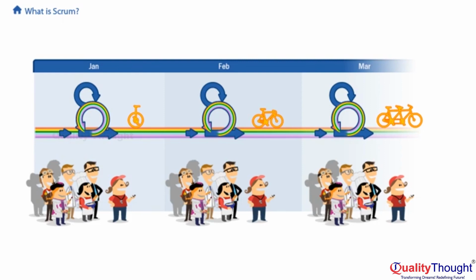Now, instead of waiting for the end to start our testing, we'll start testing with our very first sprint. Instead of doing all the design up front, we'll do a bit of design every sprint until it becomes continuous design. We'll do small amounts of continuous redesign and refactoring to avoid technical debt. Every sprint combines all aspects of the work. A Scrum team should collaborate together instead of working in phases with handoffs.